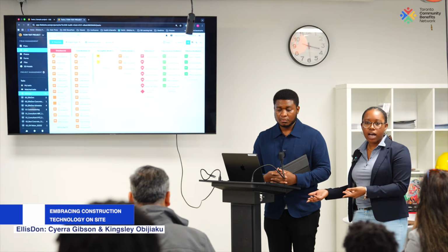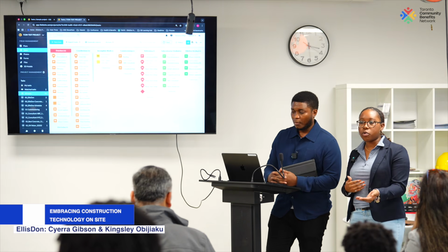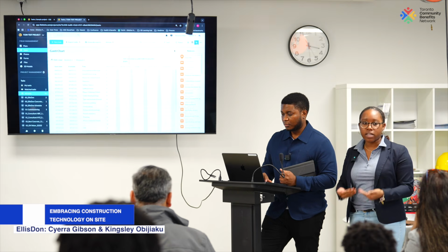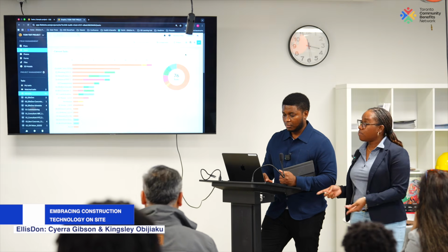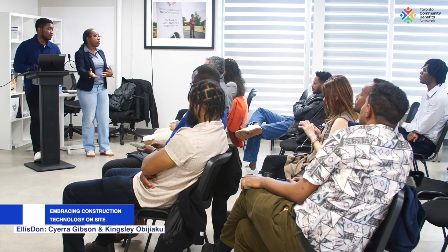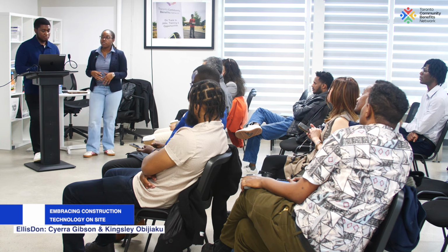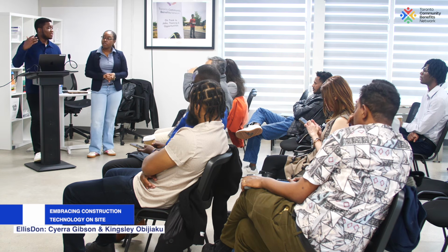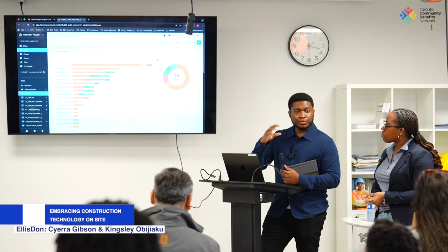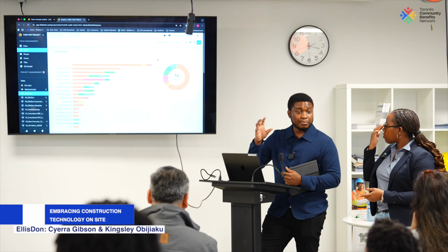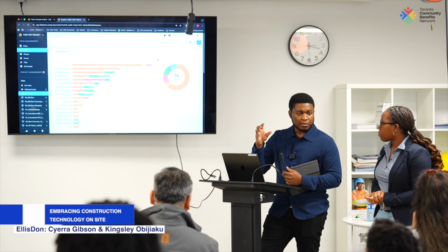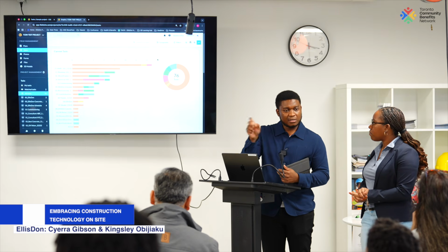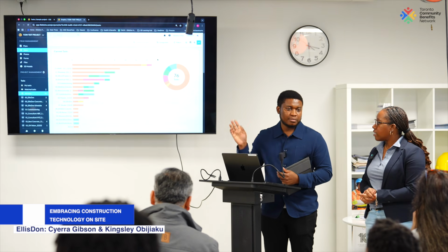And it's a good question to ask as a subcontractor when you get onboarded to a new project: what software tools am I going to be expected to use as part of this project? So this one, yes, it's only if you are already part of this project. But you said you're a commissioning agent? Yes, this could be used for commissioning as well, because the checklist items would help you. We'll create a template of commissioning items to be checked, then create a task, assign it, and you just go in and check against it.